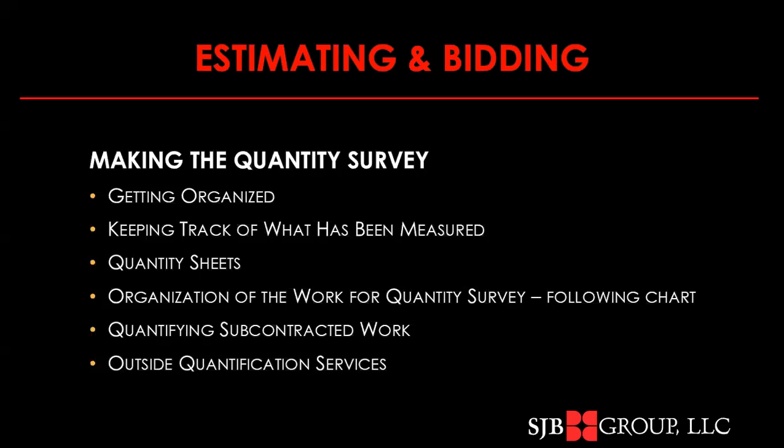And when time gets critical as the bid's getting closer, you may need to take advantage of having that number already calculated. Over time, you may have received quotations for this type of work from subs before, so you'll have a historical price to help build your judgment from.